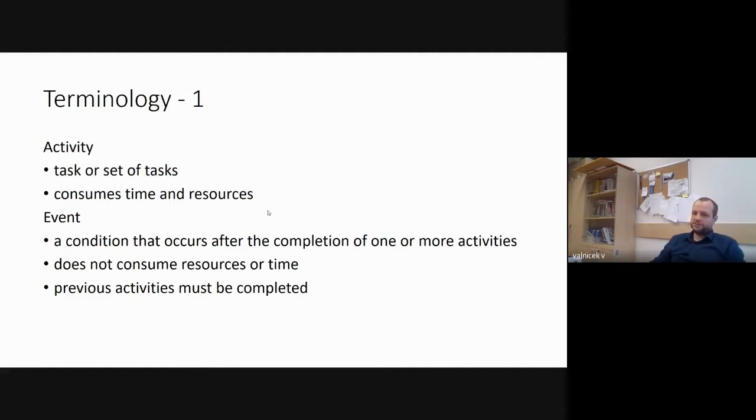Event: a condition that occurs after the completion of one or more activities. An event doesn't consume resources or time, and the previous activities must be completed.